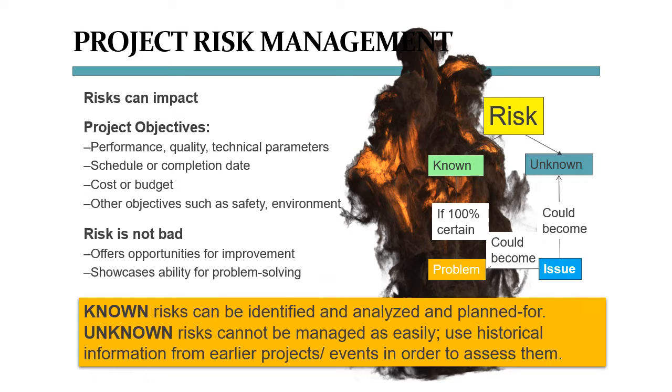Now, do we know that rain is not good for electronics? I hope we do. So that laptop breaking and us losing our file because of the rain, that was a foreseeable risk. These foreseeable risks are called known risks. So while the laptop was still dry, and we still had our file, and we knew the chance of rain was 70%, we had a risk. In fact, we had a known risk. As soon as it started raining, that risk became 100% real because our laptop did in fact break. So now we have a problem.